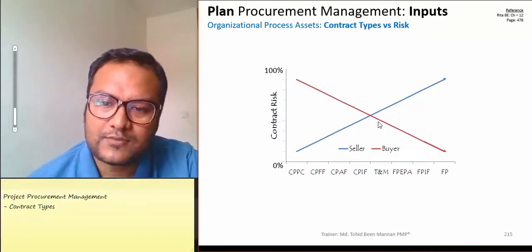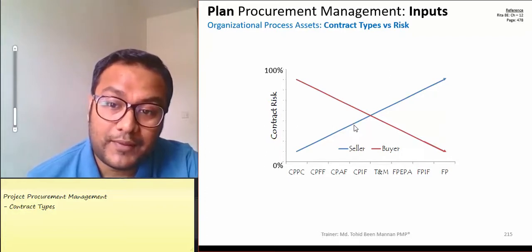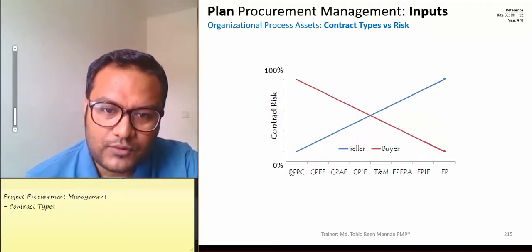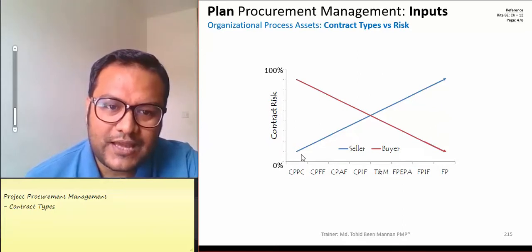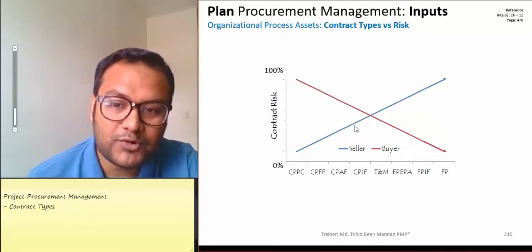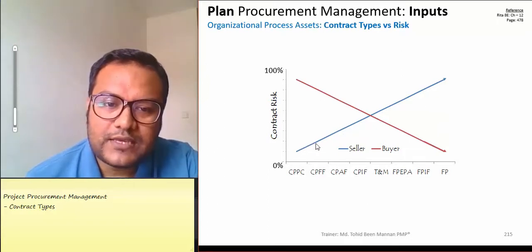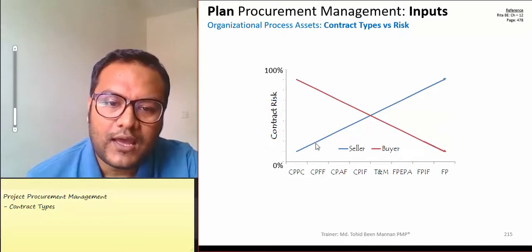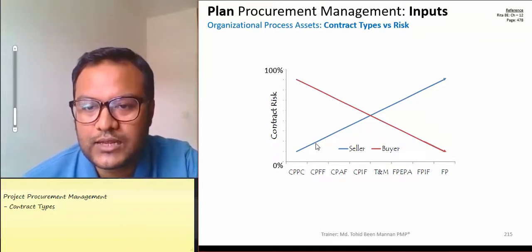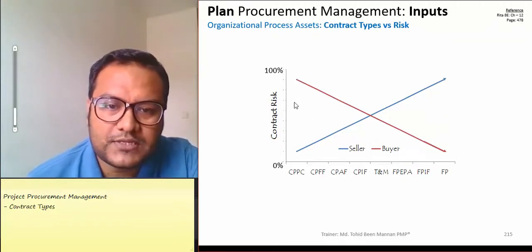Cost plus incentive fee and cost plus fixed fee carry more risk for the buyer. Cost plus percentage fee is the riskiest contract type for the buyer. The award fee and fixed fee are less risky than percentage fee. The buyer and seller risk is opposite: what is safest for the buyer is riskiest for the seller.